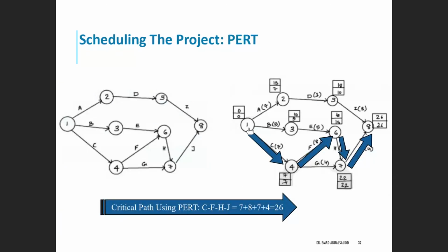You start with the nodes that, or you continue with the nodes that has the start time and the minimum and the completion time is equal. Usually when you follow the procedure of the right to left and the left to right, there is always validation point. عندك دائما حيكون نقاط تتحقق إنه إجابتك صحيحة. Always there will be the first node has 0, and always the last node it has to have equal maximum start time and minimum completion time is equal.